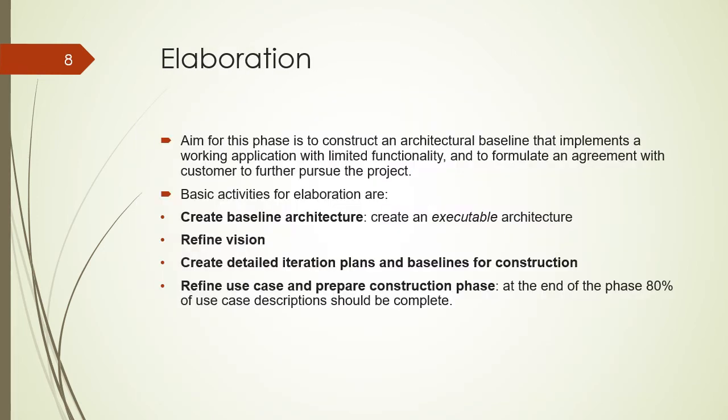Next phase is the elaboration. The aim for this phase is to construct an architecture baseline that implements a working application with limited functionality, and to formulate an agreement with the customer to further pursue the project. The basic activities for elaboration are: create baseline architecture, that is create an executable architecture, refine vision, create detailed iteration plans and baselines for construction, refine use case and prepare construction phase. That is, at the end of the phase, 80% of your use case descriptions should be complete.